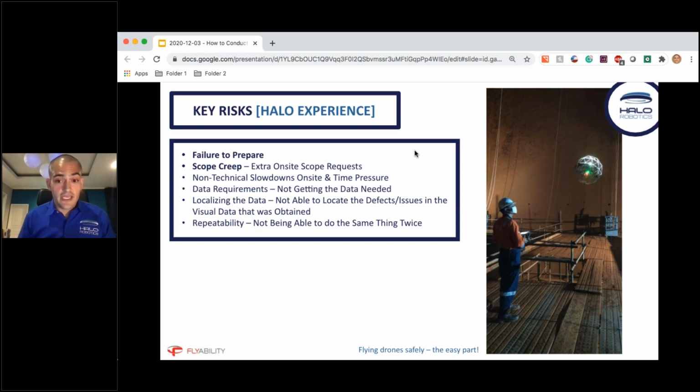It is such a key thing to be aware of, and I think it's key because of the frequency of this risk. It's very regular that this will happen, so it's very important to attend to. How we deal with that in a systematic way that organizes things with all of the people involved in the project is through method statements, and I'll talk about that in a moment.